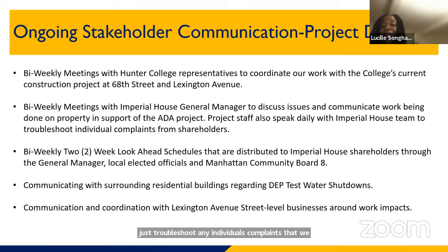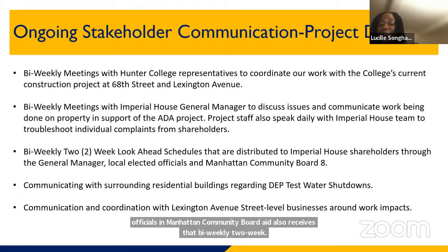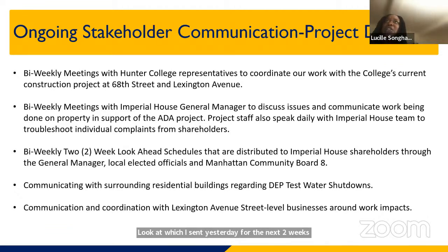Additionally, we provide a biweekly two-week look-ahead schedule that is distributed to Imperial House shareholders through the general manager. We also send that information to the local elected officials, and Manhattan Community Board 8 also receives that biweekly two-week look-ahead, which I sent yesterday for the next two weeks, or actually on Tuesday. Yeah, so I guess that was yesterday.